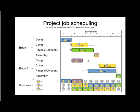What can we choose to optimize this? We can choose when we start a job — for example, instead of doing the blue job first, we could start with the yellow cover job at day six and do the blue job later. That's one dimension we can play with.